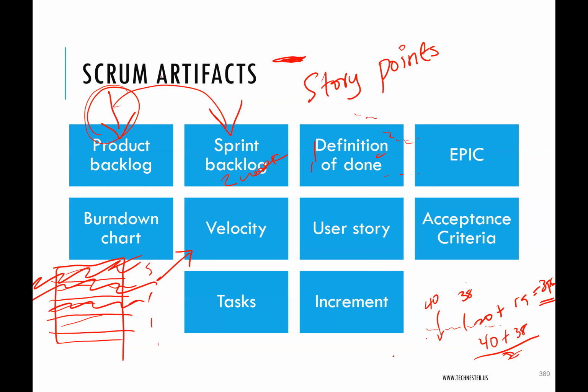So developers, product owner, scrum master, everybody will meet. We'll be looking at each story, each requirement in this product backlog. And we'll say requirement A. Of course, the requirements are already prioritized by the product owner in order of importance. So take requirement A, and then you ask the developers, what's the story point if you are using story points, or the number of hours if you are using hours, that it will take to do this task. Story point is just many times a random number.